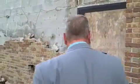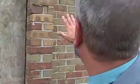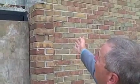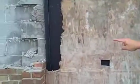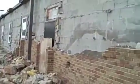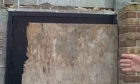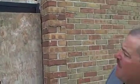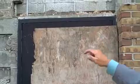Right. As we also look, we are taking out these pilasters right here. These were really nothing more than decoration. So those are going to come out, and we're going to have a flat wall. But we're running into some issues that we didn't anticipate. One of them is the different style of cinder block around our openings, whether it's a door or a window. And the problem occurs as we go to put brick back up over the raised portion of the cinder block. We're not going to get any insulation value. And in fact, we're seeing some interesting areas where we even have some bricks stuck in between the bigger cinder block for support. Okay.